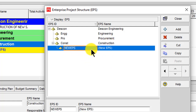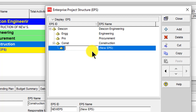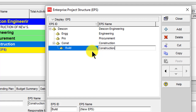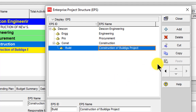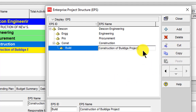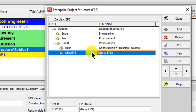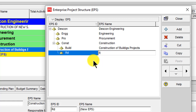Now I will add further categories. Suppose under Construction we have two main categories: Buildings — 'Construction of Building Projects' — and Roads — 'Construction of Roads Projects'.